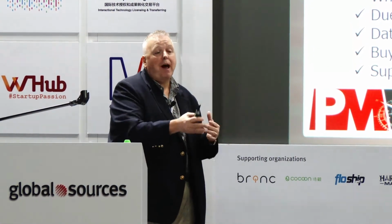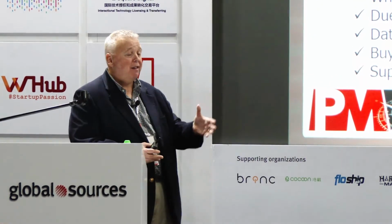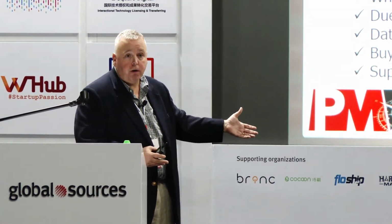Because I don't want to know that if you've given me a lead time of 40 days and I need this material that takes 25 days to procure, I don't want to wait till day 30 to find that material never got ordered. So if it's important to the manufacturing process or the production process, be very clear. What is the task? Who is responsible for it? Is it you? Is it your supplier? Is it his buyer? Is it his QC manager? Put a name in there so you know who is responsible for that task.